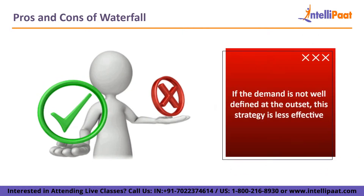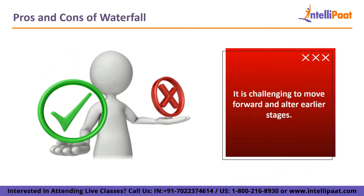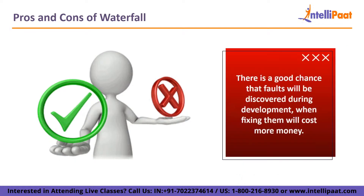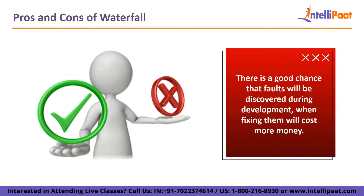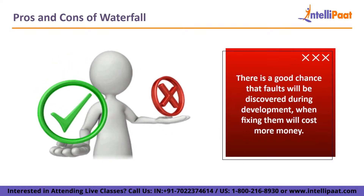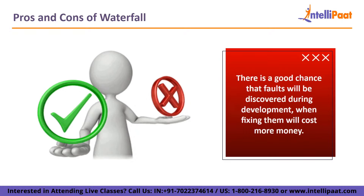Now for the disadvantages of Waterfall. If the requirements are not well defined at the outset, the strategy is less effective. It is challenging to move forward and alter earlier stages. Finally, after the design process is complete, the testing phase begins, meaning there is a good chance that faults will be discovered during development when fixing them will cost more money.